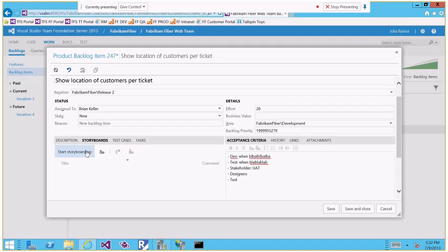One thing here that is very important for you to know: when you create these storyboards, as they are documents, it's a PowerPoint document, it has to be accessible for everyone. The way to host this document for this project is through SharePoint. So you cannot have, for example, storyboards if you don't have SharePoint. So what you do is you set up a SharePoint. In the SharePoint you have your library of documents, and there you will host all these documents that are going to be related with this product backlog item. So this is one of the reasons why you maybe should have SharePoint with a setup for this collection.